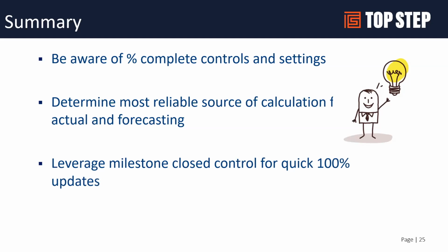And then, if you are doing milestones, percent complete, leveraging that quick 100% update is a good way to trigger billing, trigger revenue recognition, if that's your methodology, rather than having to have someone manually set the percent complete or some other method. So it's a good option.